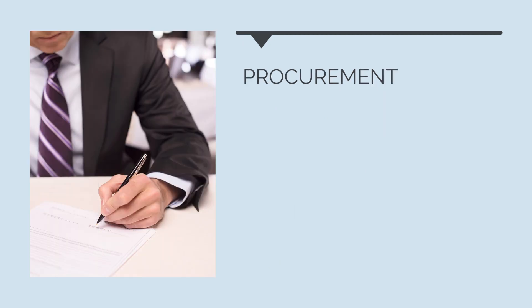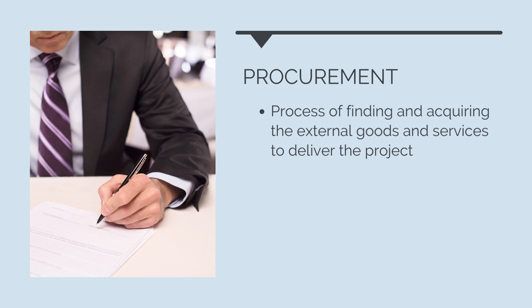Procurement is closely related to contract management. Procurement is the process of finding and acquiring the external goods and services needed to deliver a project. For us, the general contractor, this means finding and signing subcontract agreements with all of the subcontractors and suppliers we need to complete the project scope.